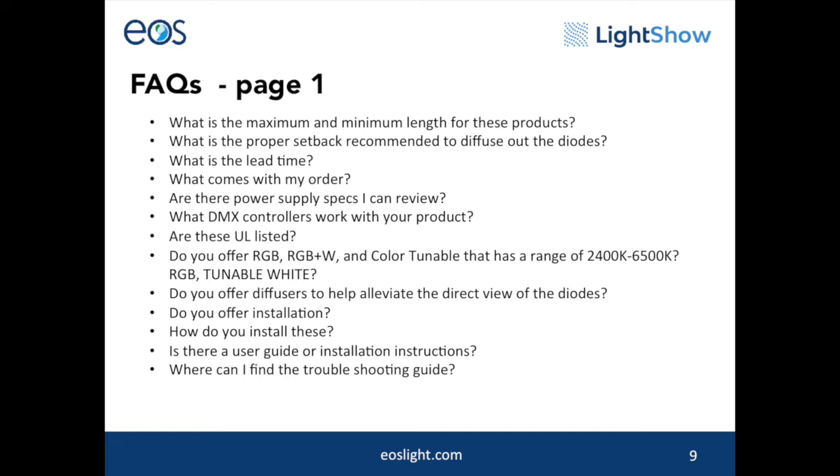16 weeks is a typical lead time from ARO to shipping. However, all lead times are subject to review at the time of order. What comes with my order? LightShow and LightShow Max systems consist of mounting hardware, mesh, LED, low voltage power and data leader cables, and low voltage power and data supplies. Data distribution and control are often reviewed on a case-by-case basis.